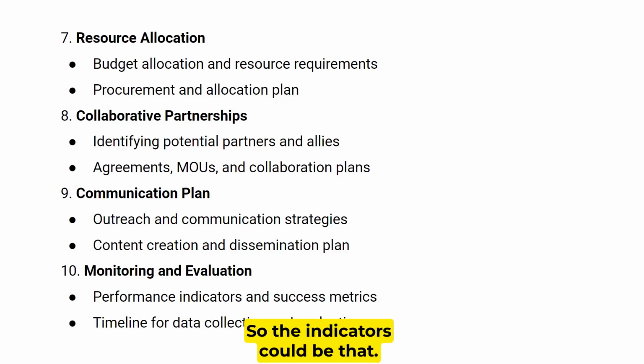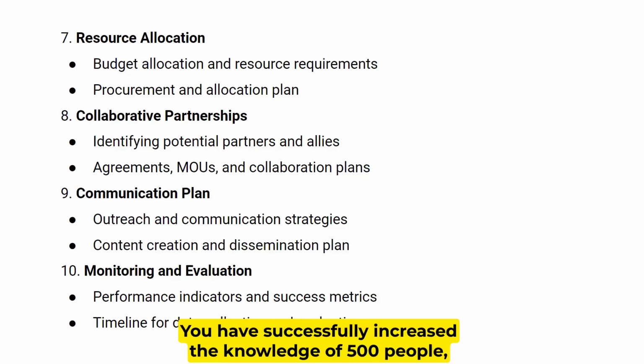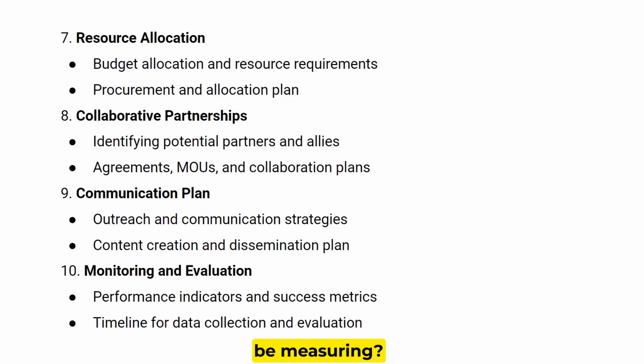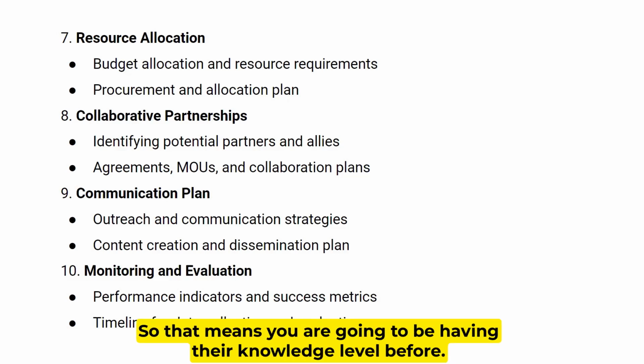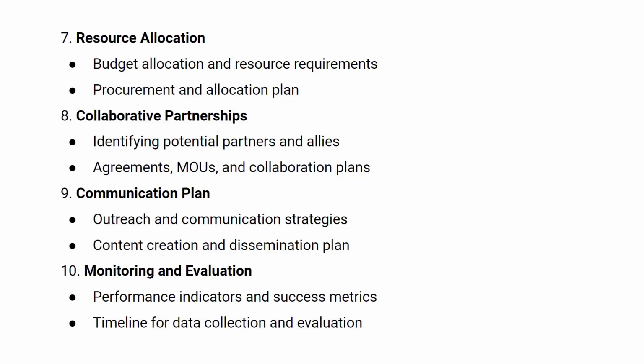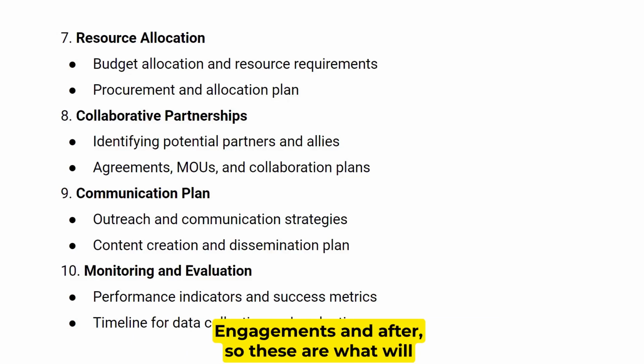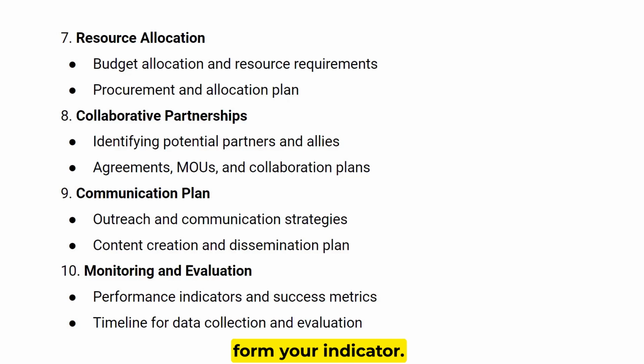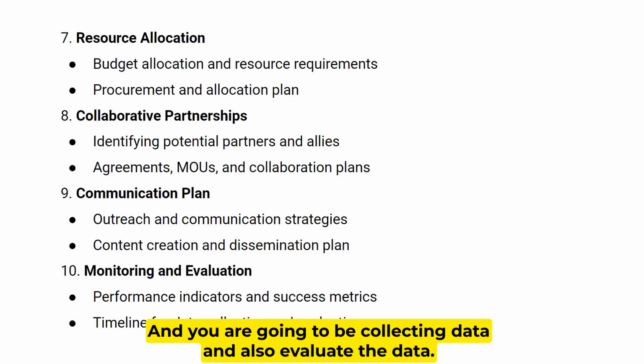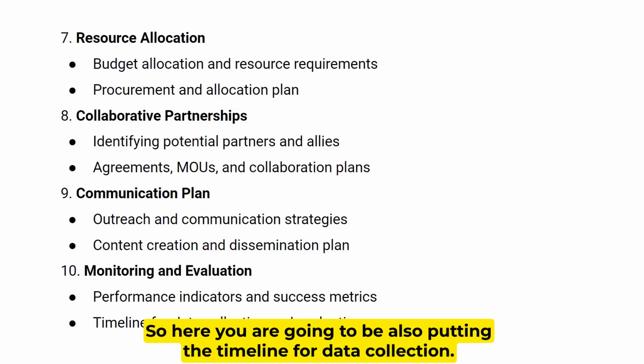The indicators could be that you have successfully increased the knowledge of 500 people. So what are you going to be measuring? Their knowledge. That means you are going to have their knowledge level before the engagement and after. So these are what will form your indicators. You are going to be designing a monitoring and evaluation plan, collecting data and also evaluating the data. Here you are also going to be putting the timeline for data collection.